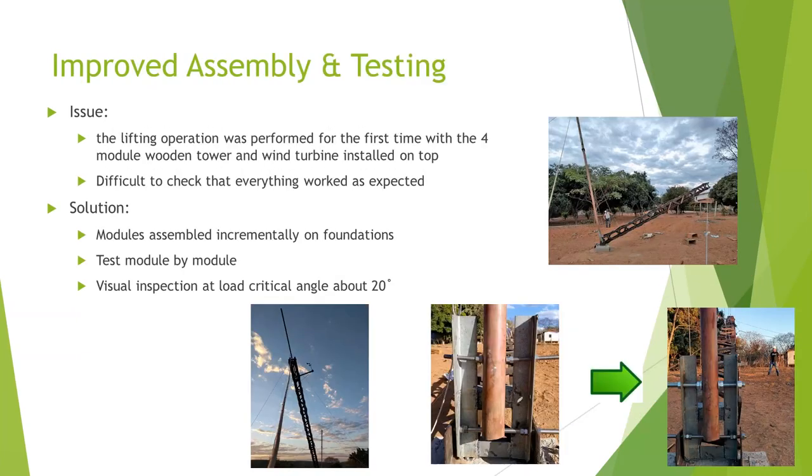Okay, well, the other thing that we did, which maybe, if they had more time last time, would have helped them, is that we tested the system really component by component, and that's actually how we discovered a lot of problems that would have arisen. So first of all, we just welded the hinge system together and we tested the hinge system by itself. Did that all work? Did all the bolts go through correctly?